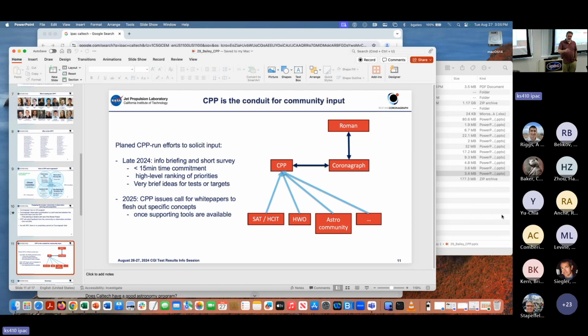You even had a discussion over lunch, if we're going to be talking about that, CGI made a conscious decision to limit it to 10 hours for stability, because that's something that you can model, you can test. We've had the same debate on LISA, whether we go all the way down to 0.001 millihertz. And the idea was, no, that'll be so expensive in I&T to verify all those requirements. That's a goal. There's no reason why we can't model that, but we're not going to require it.